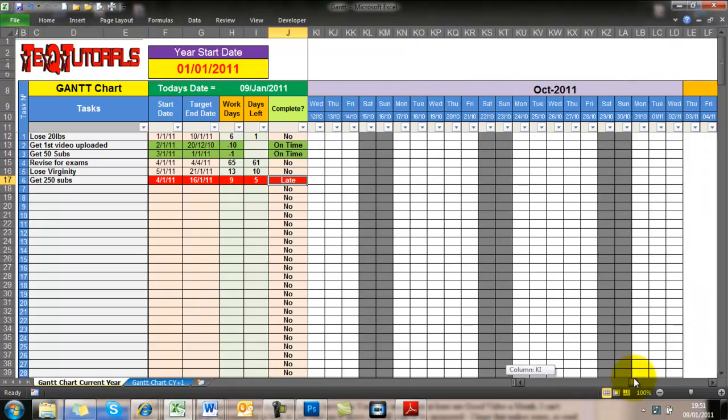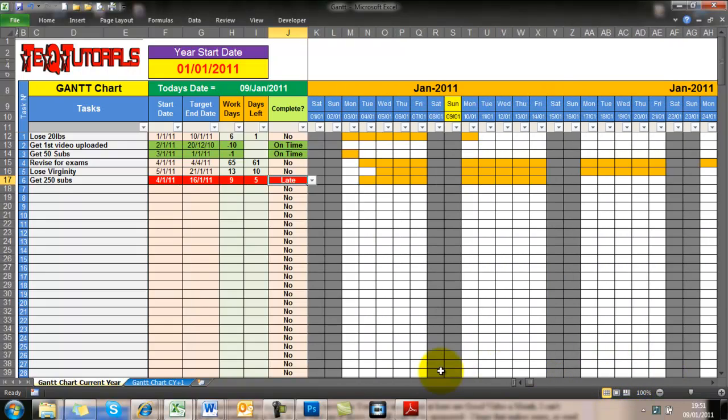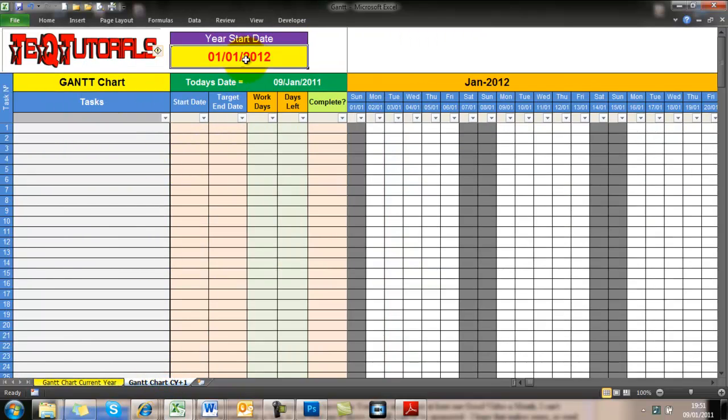So you put the start date in and the end date. It gives you how many work days are there, how many days are left after the task is done. When you do it, you tell it whether or not you do it on time or out of time.